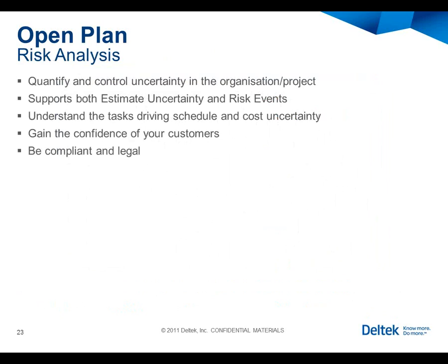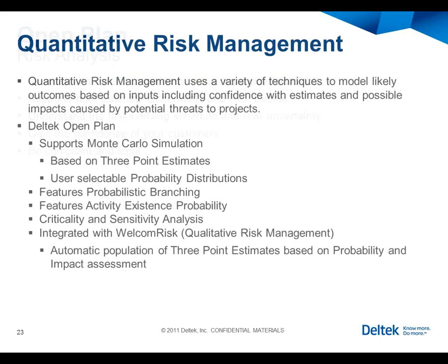Now, OpenPlan also supports risk analysis. We won't go through all of the slides here in this slide deck, but OpenPlan does support risk analysis from a Monte Carlo risk simulation perspective. It's based upon 3-point estimates. A user can select the probability distributions. OpenPlan supports probabilistic branching, so defining the probability of a logic branch being executed during the risk analysis process.